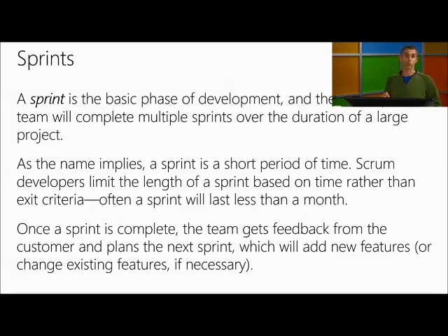Each sprint includes a very specific set of features. Those are the user stories that are included. They deliver a very specific set of functionality. The development, test, and then the retrospective and the feedback loop from the customer all happen within that time, including the deployment to the production system. So actually, within that 2 or 3 week period, the user starts by saying what they want, and then they get something at the end. So that's the business user.